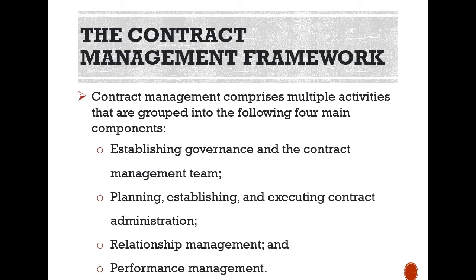The contract management framework. Contract management comprises multiple activities that are grouped into the following four main components: establishing governance and the contract management team; planning, establishing, and executing contract administration; relationship management; and performance management.